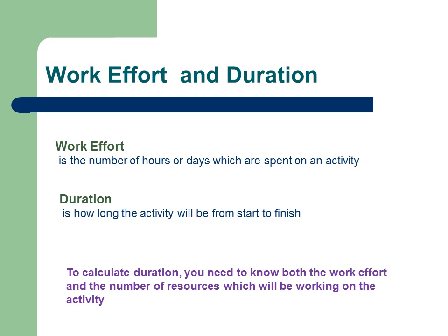When creating a schedule, it is important to determine the duration of each activity. Firstly, you must determine the amount of work effort. Then you must determine how many people you can assign to that activity. The duration can then be estimated accordingly. Remember that work effort may vary according to the skills of resources available. Estimating work effort and duration should always be done in conjunction with subject matter experts who have had prior experience with that type of work.